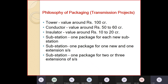Substation normally, if it is a new substation, is one package. Two substations may become two packages. There may also be substation extension. Substation is normally one package per new substation and one per extension. If there is one new substation and one extension, both can be combined. It also depends on the volume. Two or three substations can be combined if the volume is such that sufficient competition in bidding is evident.